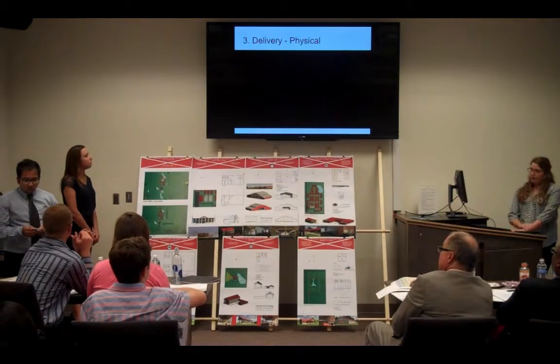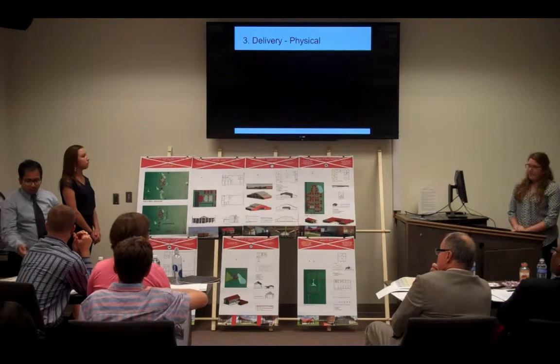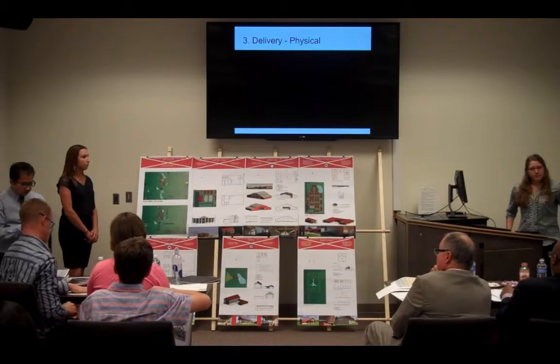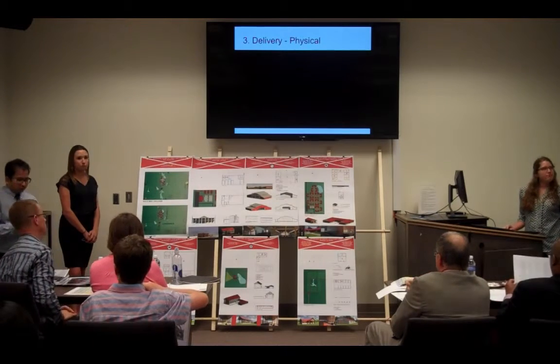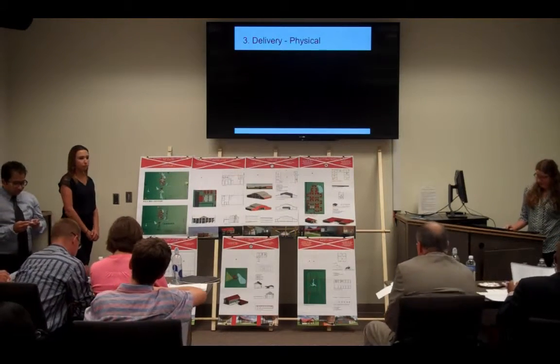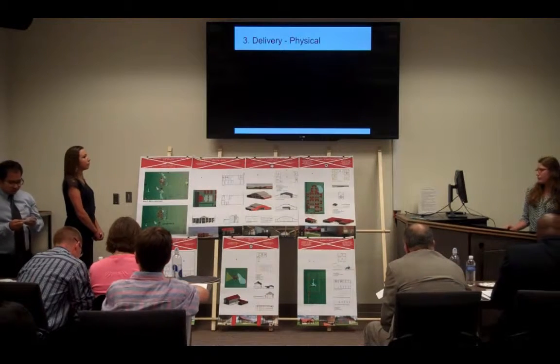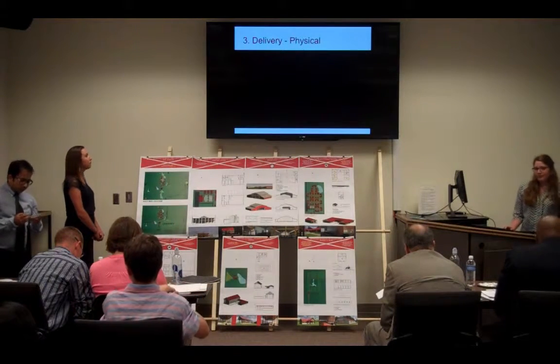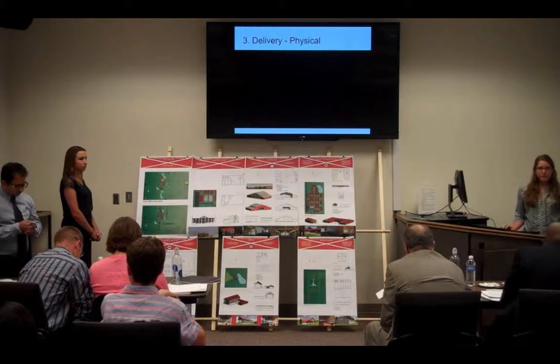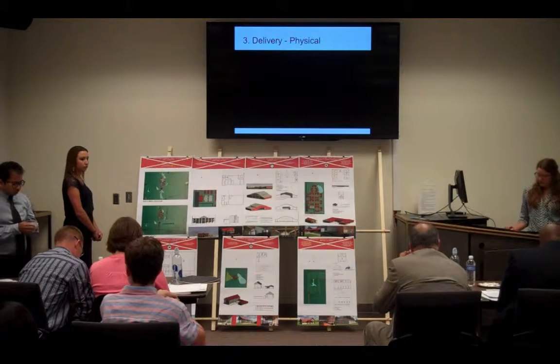Alright, so I'll be talking about the cost and the phasing, so if you can look at the sheets that I distributed at the beginning of the presentation. So phase 1 takes around 315 days and costs around $1.85 million. Phase 2 takes around 114 days and costs around $2.3 million. And phase 3 and 4, which are approximately similar phases, take around 150 days and cost around $1.2 million.